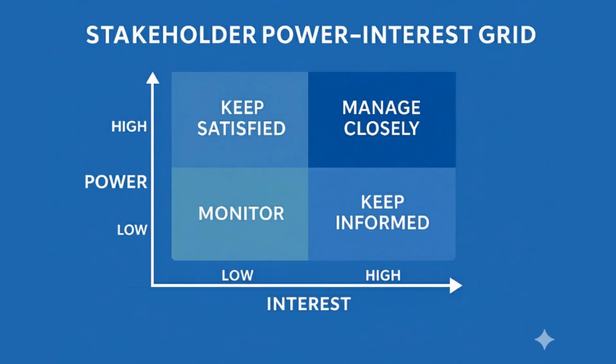The strategy that you use to deal with these stakeholders could be weekly executive dashboards, steering committee reviews, compliance updates. You will involve them in risk decisions, for example data security, regulatory deadlines. You need to ensure transparency is there. You will actively engage them throughout the project lifecycle. You're going to provide them frequent updates. You're going to manage their expectations directly. You're going to involve them directly in decision making.